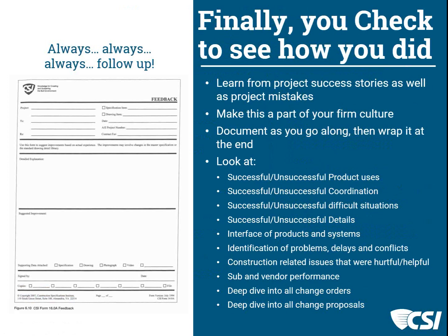And I'll say this last word and then check for questions. Particularly do this if your firm uses prototype design and you're working for a client more than once. There is little that is more embarrassing than having the same change order happen on the same building with the same client more than once. And skipping this checkup on how you did in the end could have kept you from doing that. So don't just do it to check a box, but do it to learn.